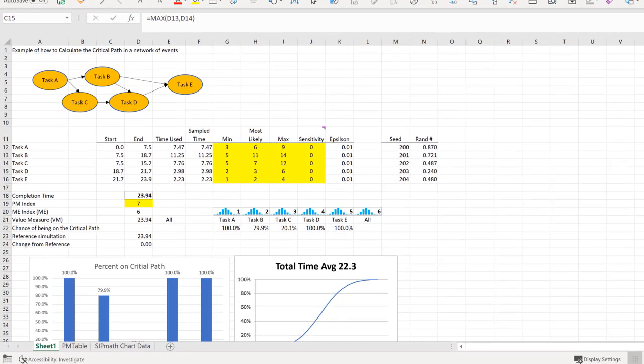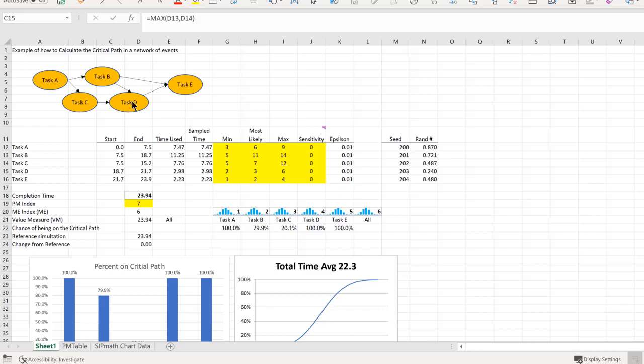As an addendum, what would happen if we eliminated the requirement for D to not start until B is completed? In other words, we eliminate this arrow here. We might think of this as a mitigation.